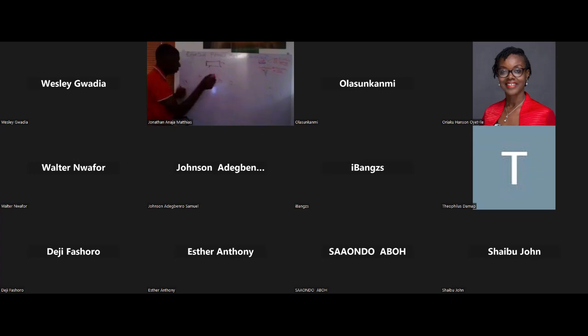What I did with bottom up before was that I took foundation, right? I saved my foundation from past record is 60 million. I now say foundation as excavate, foundation as block work, foundation as filling. I now allocate money to each stage of the work. That was what I did. I carried the 60 million worth of foundation and I spread it.